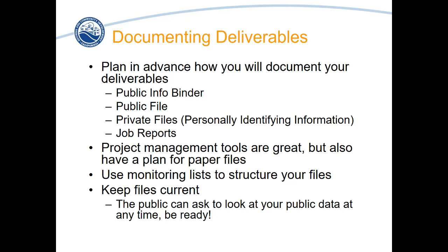If you're doing a project that has regular job reports, keep a running log. You want to make sure that you have that information available so that you know what dates your inspectors went out, what they looked at, what they saw, what issues were identified. I also like to use meeting minutes and meeting agendas to help keep track. Memos are another good mechanism. Project management tools are awesome, but if you're going to be using paper files, you want to make sure you have a plan. I know a lot of us are trying to move away from paper, but that's still a fact of life, so you do want to have a mechanism for keeping track of your paper documents.